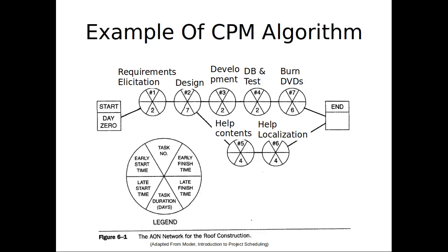Yeah, their paywire is the same, right? The late start is the same as the early start. Late finish is the same as the early finish. Ladies and gentlemen, that's a sign that that is the critical path. We'd say that there's zero float, there's zero give, there's zero slack. You can use different terms to describe it. But basically, this upper path has to go on time to avoid delaying the entire project.